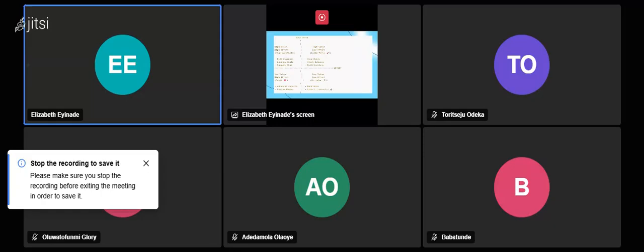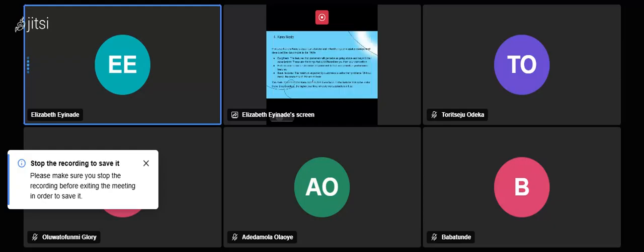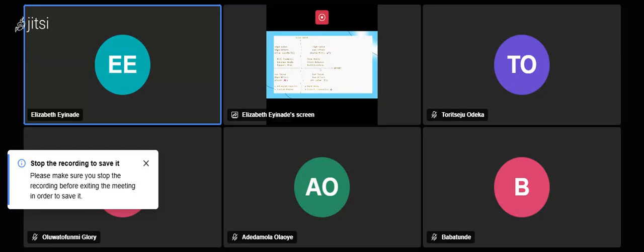Then another one is low value, low effort. Do this one later. These particular ones are regarded as fillers. When you hit a blocker, like I said earlier, your engineering team, rather than staying idle, can quickly work on these, like the export transaction feature, like the dark mode.